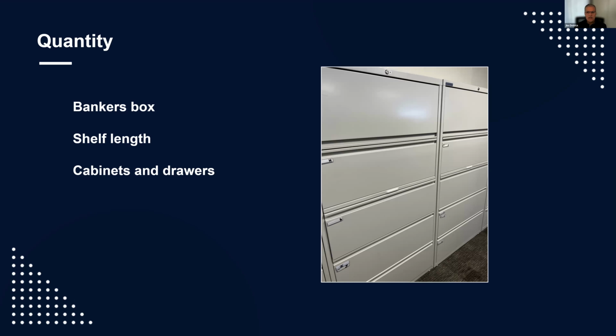So when we are assessing collections like this, we measure the width, we look at how they're stored within, and again, we try to convert that to a how-many-boxes-per-drawer type of metric. Our favorite unit, at least for estimating, is the banker's box, because everyone knows what that means.